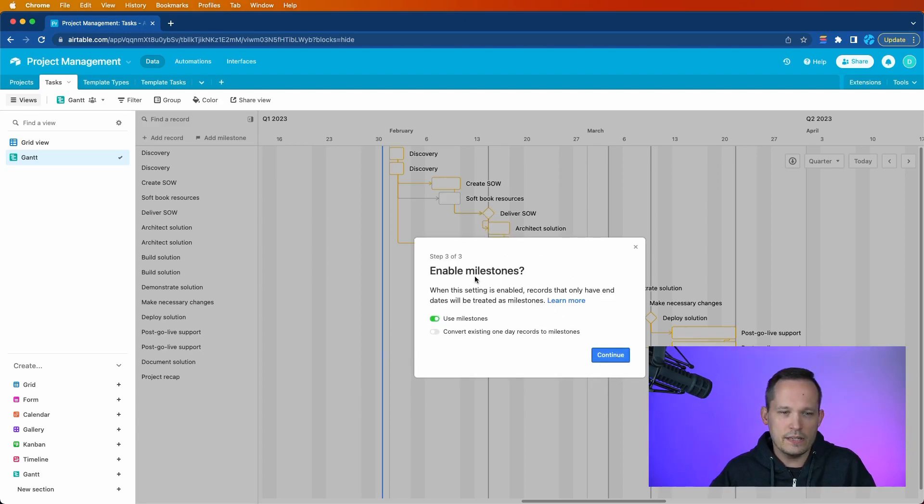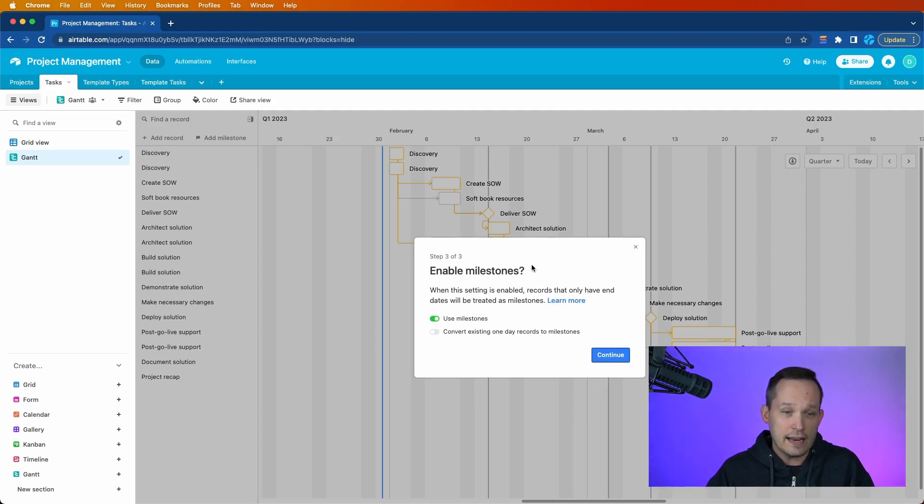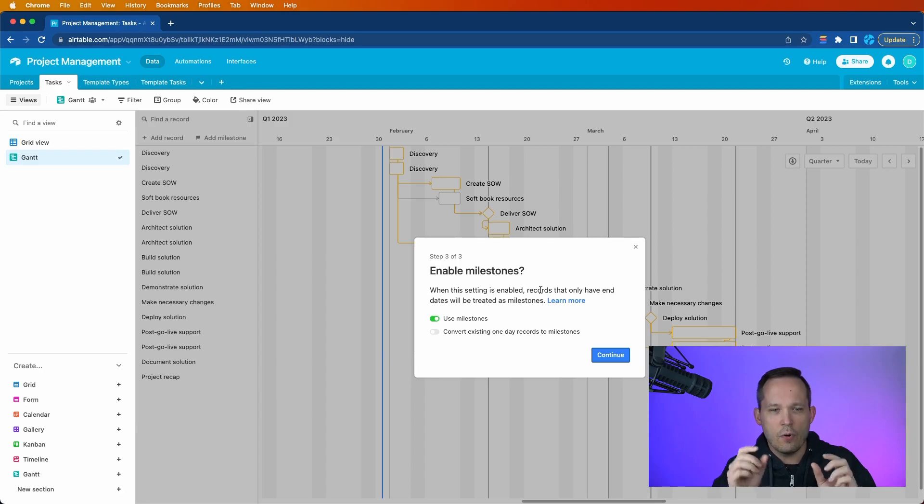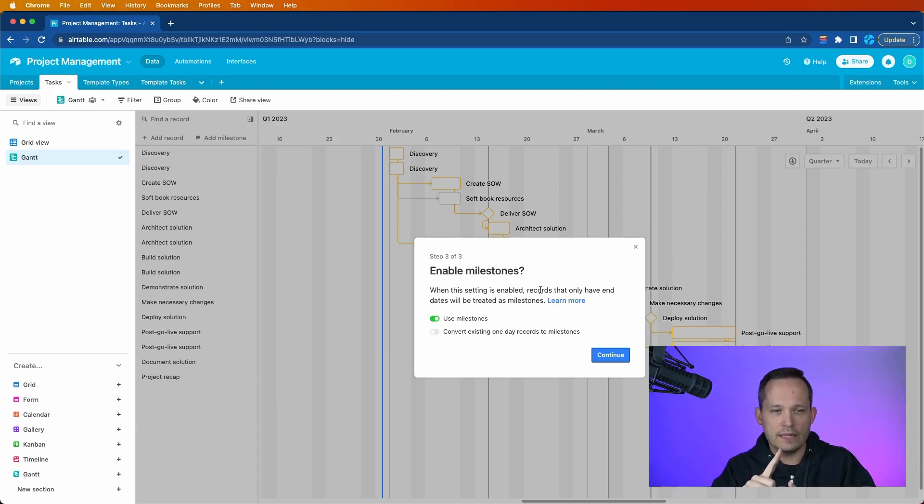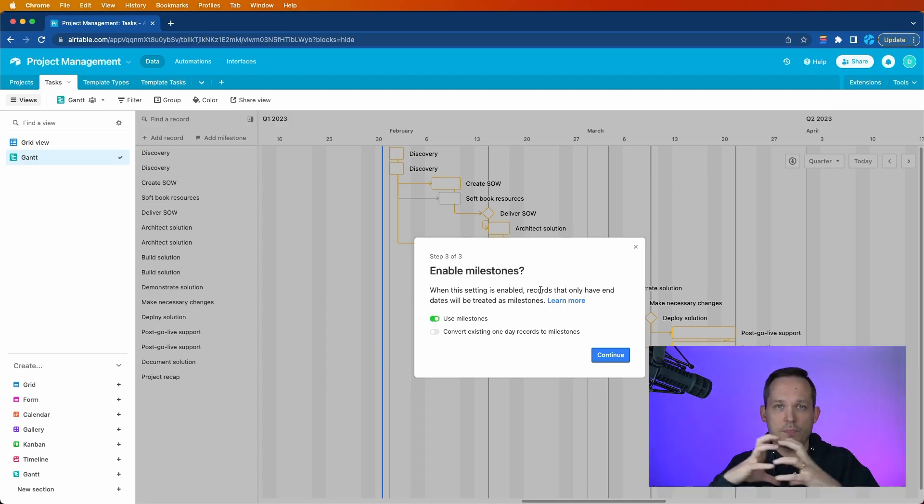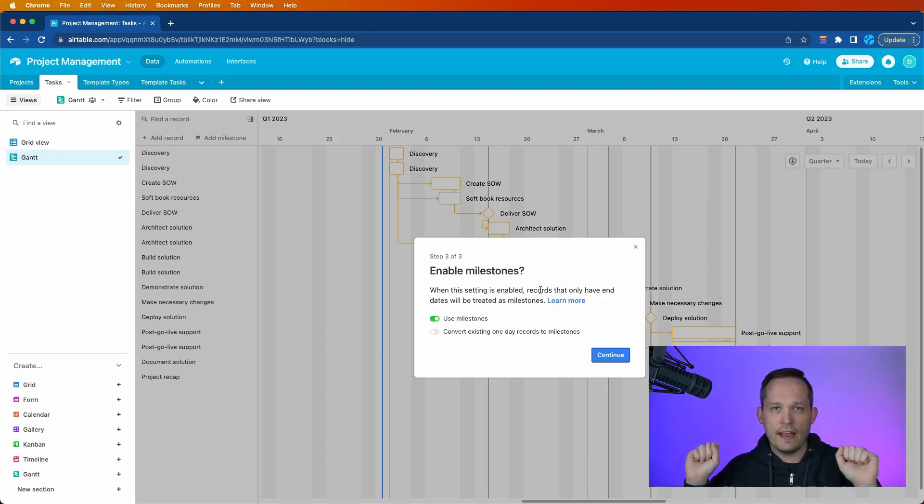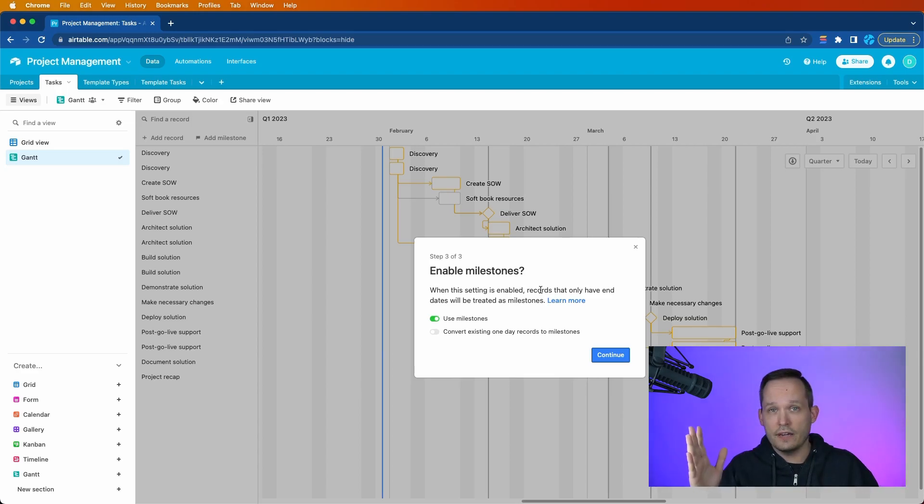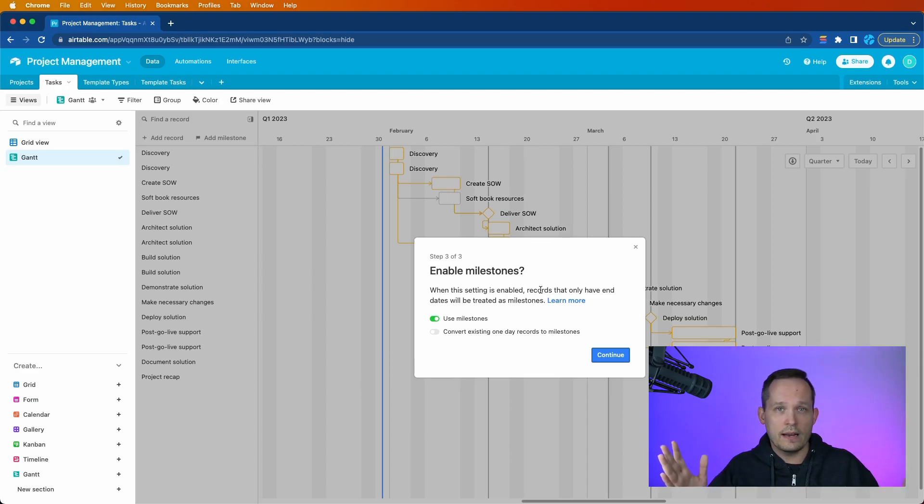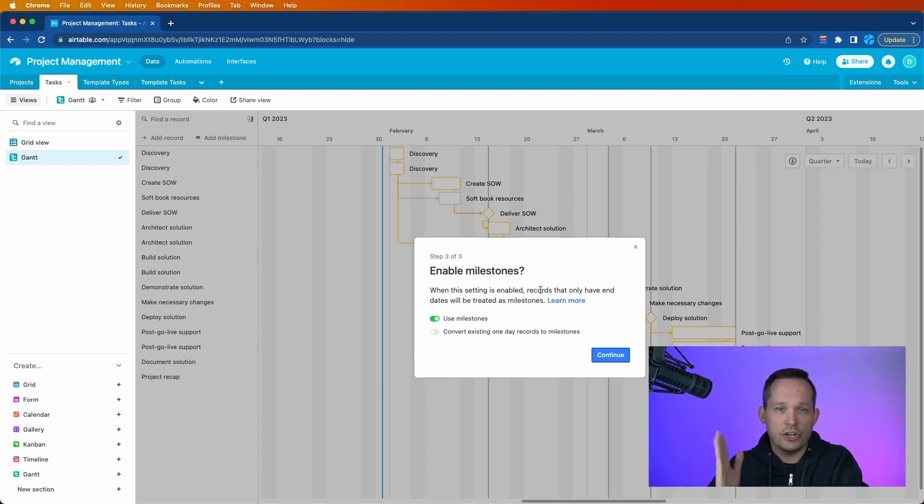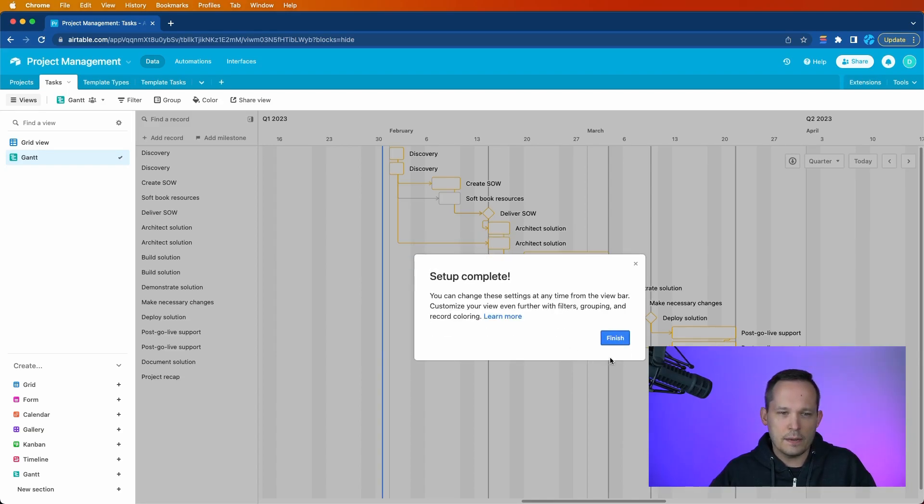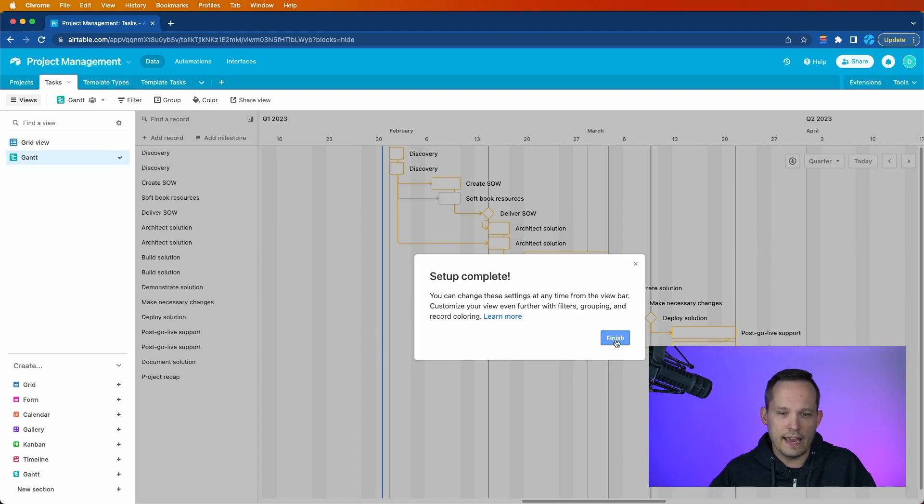And the final thing that we need to do is decide whether we want to enable milestones. I definitely want milestones enabled. Typically, you're going to use it for either the end of a phase, you'll have a milestone or the more specific meaning for the purpose of Airtable is really any event that just has a single date. So if you're working on something that spans multiple days, but let's say you have a meeting with a client, that could be a milestone because it's just a single point in time. You could have a deliverable, like I'm creating an SOW. The creation of it would be multiple days that it would take me to work on it. But delivering the SOW would be a single milestone. It just has a date. In this case, I am going to utilize milestones. And you'll see that this appears a little bit different visually inside of the Gantt view. We'll go ahead and finish this.